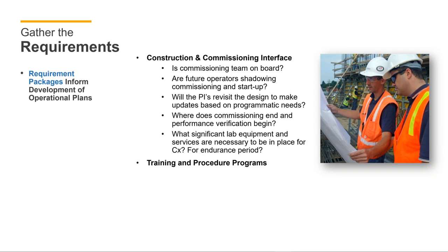Construction and commissioning interface. We're going to make a strong case today that operational planning should be an integrated process with the design process, the construction, and the commissioning. So what does that look like? What does that communication pathway look like? Do you have the principal investigators or the users? Are they involved in any program changes? That's every contractor's worst nightmare, is finding out that there have been changes and we're already pouring concrete.